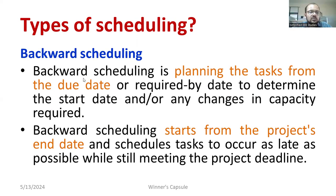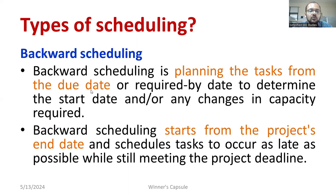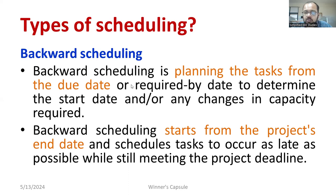In the case of backward scheduling, it is just like reverse engineering. The planning of tasks starts from the due date. You need to know when the project will be delivered — the due date. From the due date back to the beginning date, you schedule day by day to determine the start date. From end to beginning — that is called backward scheduling. We come to know when we are supposed to deliver the project to the client, and from that date backwards, we prepare the schedule.